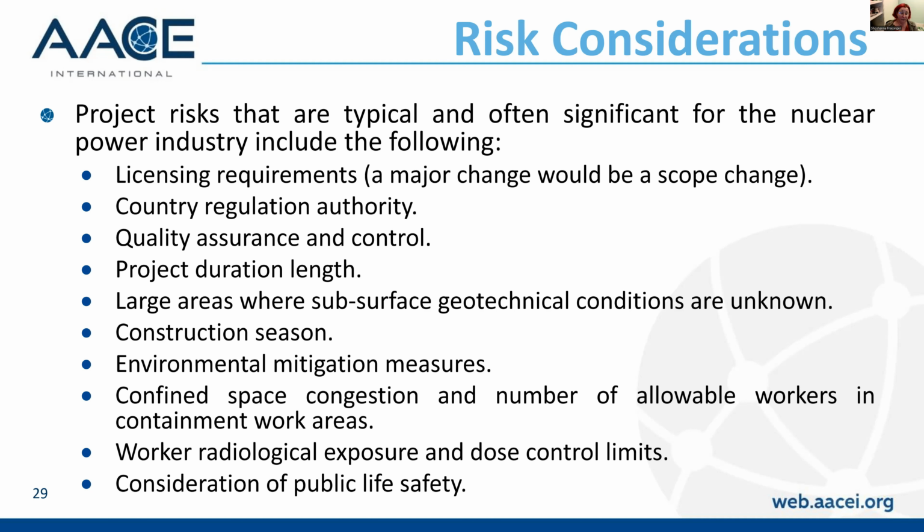Conversely, if we have something that we've done before, we really know how to do this, we do this well, this is so in our wheelhouse that we can't even find the walls of the house, then we can consider that something that doesn't have a lot of risk, and the accuracy can obviously be much finer. So we could in fact say we're producing a class 3 estimate at a point in time where we might otherwise be considered to be developing a class 5 earlier in project development. We know a lot.